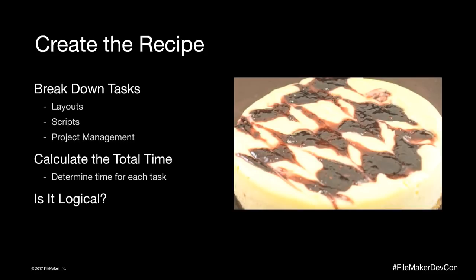But my recommendation is to never actually start the project until you do this whole breakdown and you actually come up with a number. What if you do this breakdown and you thought it would be 20 to 30,000 and it ends up being a lot more?